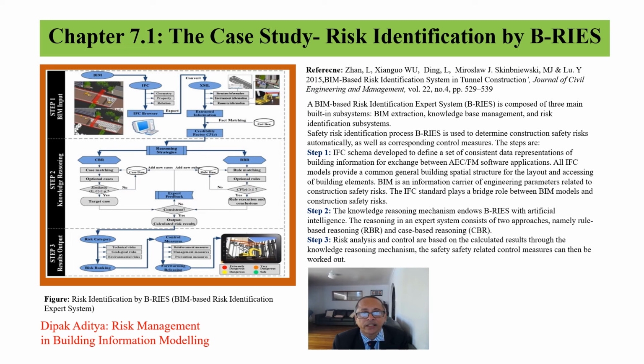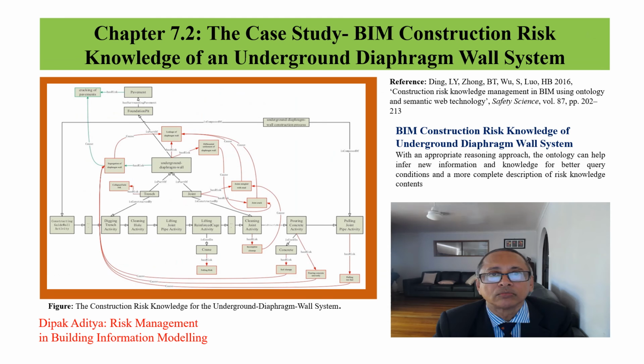In BRIES, the IFC standards play a bridge between the BIM data in construction safety risk. An integrated knowledge base, rule base, and case base are then established to systematize the fragmented explicit and tacit knowledge. Finally, a hybrid inference approach with case-based reasoning and rule-based reasoning combined is developed to improve the flexibility and comprehensiveness of the system. Case study: construction risk knowledge of the underground diaphragm wall system.